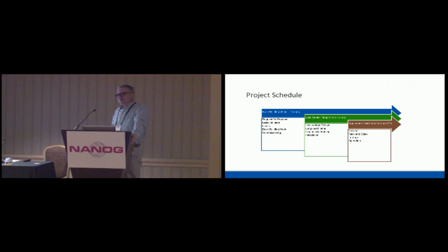And then monitoring the installation process, making sure that either the data center provider or you have someone there as your owner's representative monitoring that work as it goes in. And then comes the turn-up. That's when you get to turn it into a data center, so that's when you turn up your network. Again, there may be long lead time items on network, and there may be a need to build additional network out there in the world.